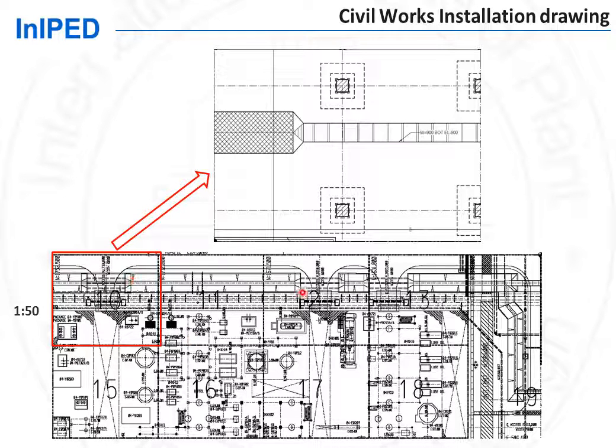For each area, an area drawing is issued, which will eventually show all the underground constructions and networks in this particular area. Nevertheless, these constructions and networks are progressively designed. Therefore, these area drawings will be subject to numerous revisions. They will be issued in the same sequence as the works at site.